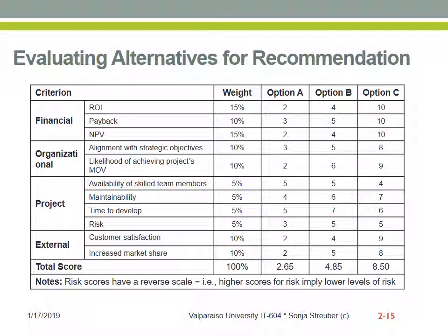Each of these criteria receive a weighting score here, and then these weights and the evaluations are applied to various different project options. Here we see A, B, and C. And the project with the highest total score then will rank at the top of the execution list, whereas projects with a lower total score will go further down on the project priority list.